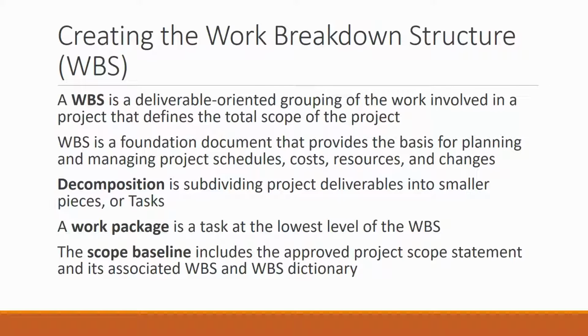Now I want you to notice that it says deliverable-oriented grouping. It's very important that in the early stages we define what those deliverables will be for the project, because the deliverables are how we organize and put together our work breakdown structure. It is also a foundational document that provides a variety of help to us throughout our project, throughout our execution.